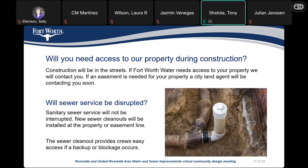Will access be provided to property during construction? Most of the water or sewer replacements will be installed in the streets. If the city or the contractor needs to access private property, you will be contacted, and a city land agent will likely reach out to you. Will sewer service be disrupted? For this type of project, we typically do not interrupt sewer service. We will be installing new sanitary sewer clean-outs at the property or easement lines. These clean-outs facilitate easy access into your property and to the city's main in the event of a backup or blockage.